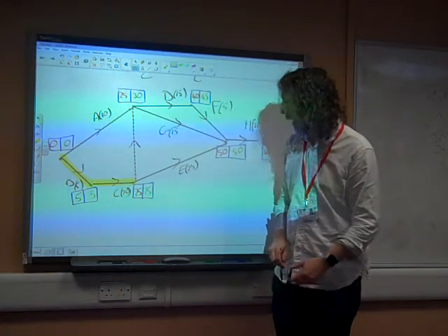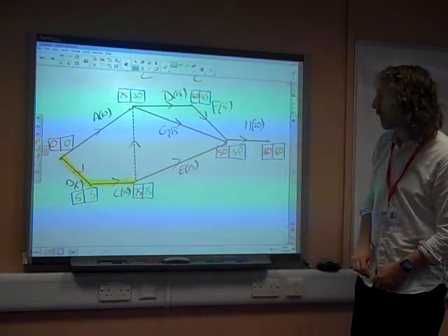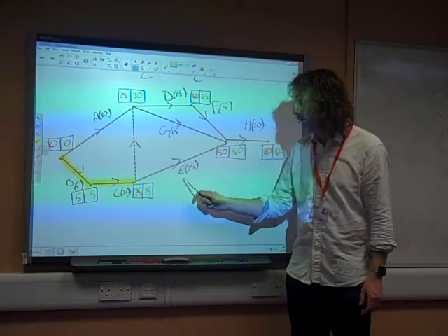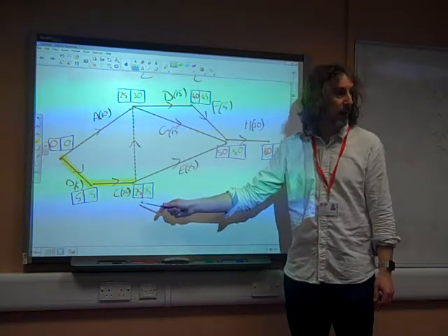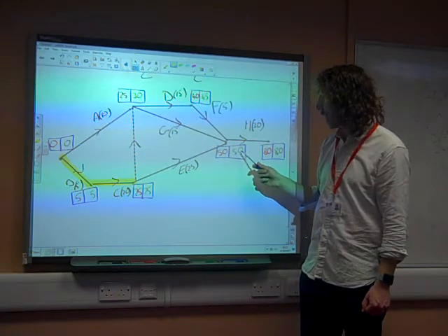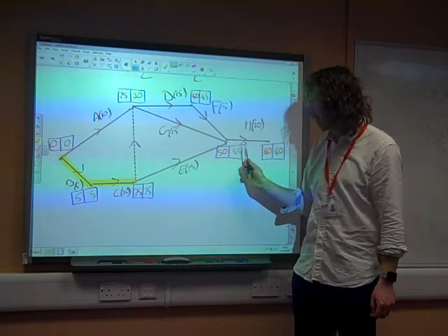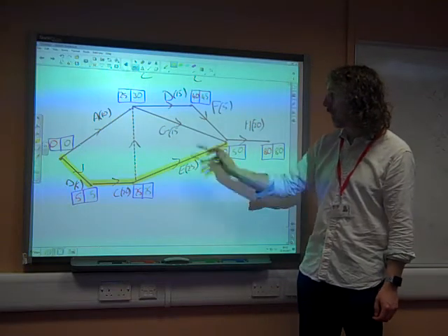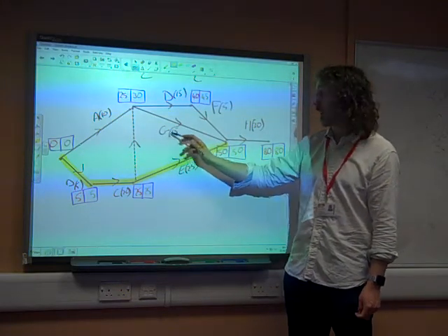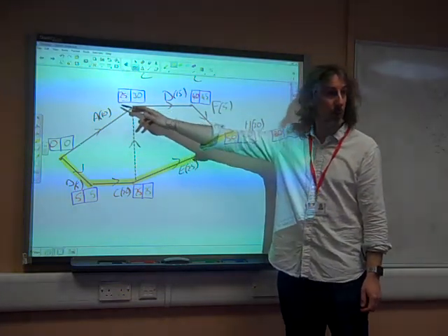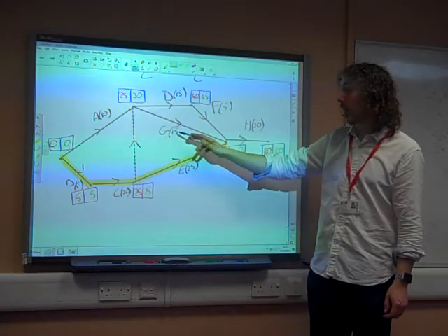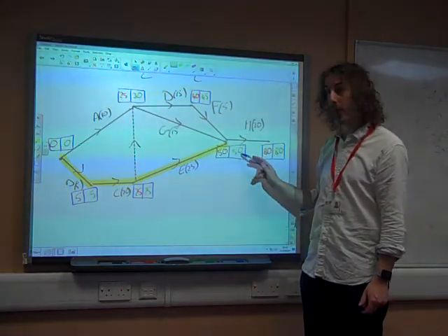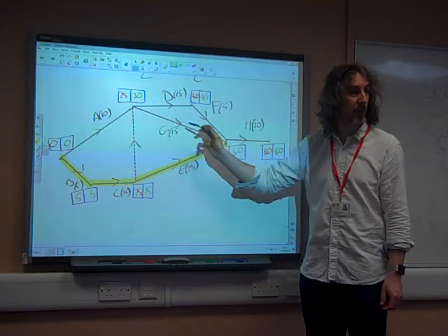C is critical as well. What else have we got? E, earliest start time is 25, latest finish time is 50, and it lasts that time, so that is critical as well. None of the others are critical. G can start at 25, and so it would be finished by 40, but it has to be finished by 50, so we've got a bit of flexibility in there.